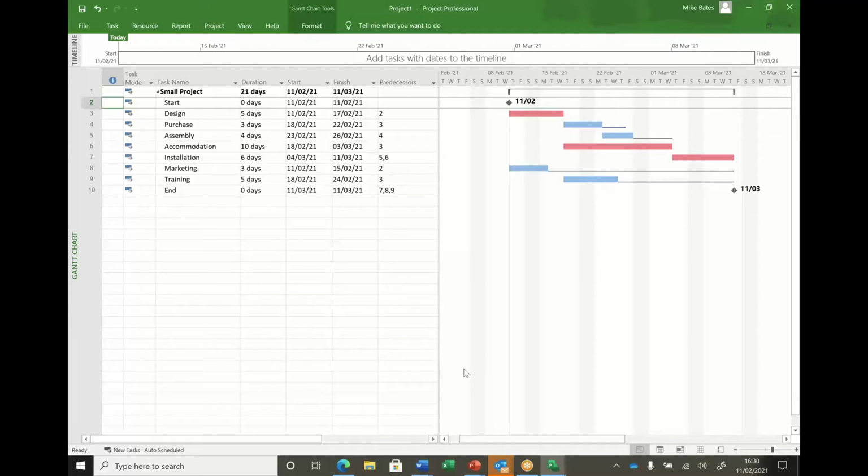The purchase task is going to go to 7 days. What's the impact on durations, critical path, that sort of stuff? Would the duration extend? There's no woulds, no ifs on this. It will what, Joe? Extend by a day, and the purchase and assembly would be on the critical path?